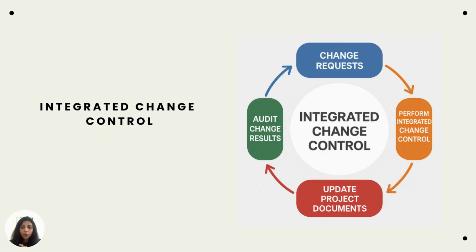If a customer requests a new feature, like a scope change, we must immediately ask, how will this affect our schedule? How will it affect our cost? So, what new risks does this introduce to our project? So, that is the integrated change control process. The process is rigorous because it has to be.